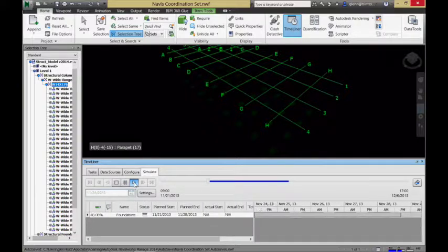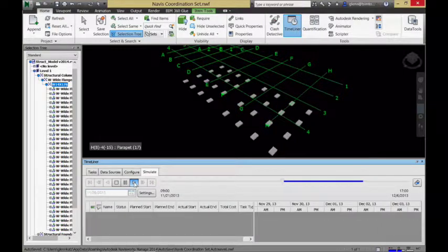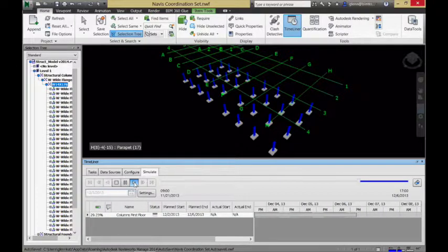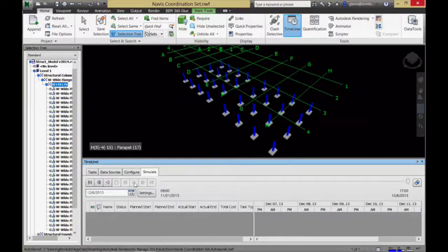You can see as we move through time, the foundations are being completed a certain percentage. They actually sort of drop on in there, a chunk. Now, that's not probably a very fair representation. Now we're going to get the first 4 columns, a chunk. What would really happen is we would probably build them in some sort of order. Maybe the foundations in this part of the building would start first, then a few days later these and those. We'd sort of roll through.